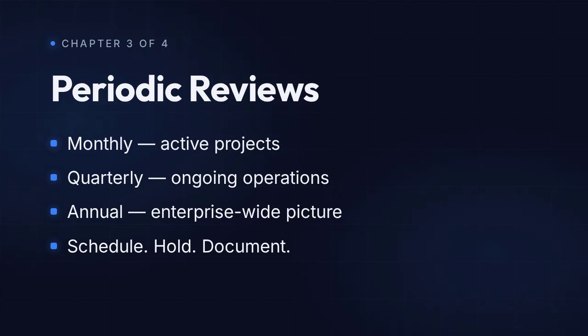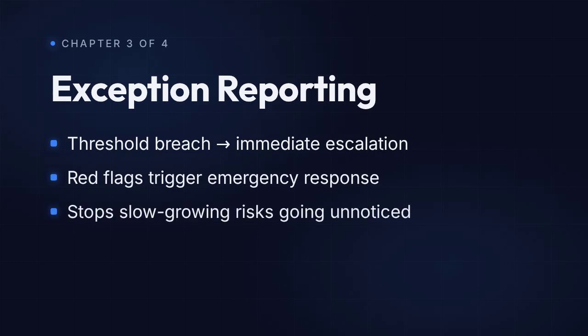Fourth, exception reporting. The moment a risk exceeds a defined threshold, it gets escalated immediately. Red flags trigger emergency response. The whole point is to avoid the situation where a known risk quietly grows for 6 months because no one was watching.